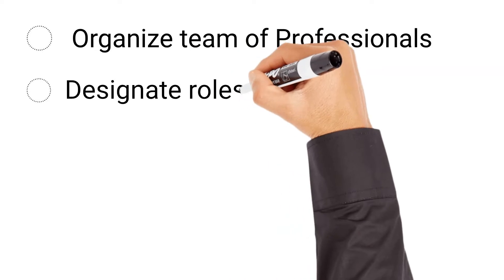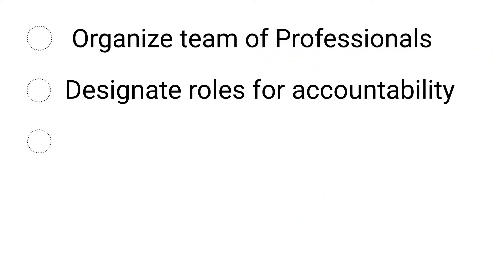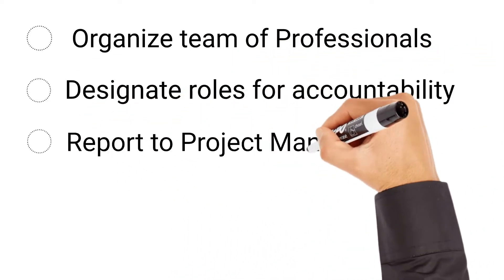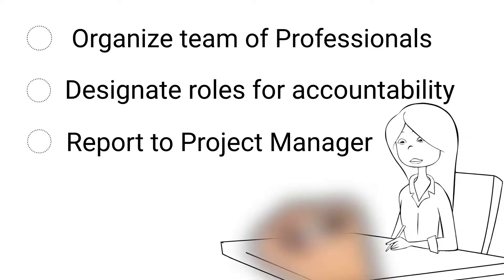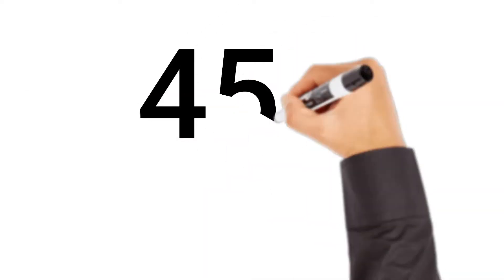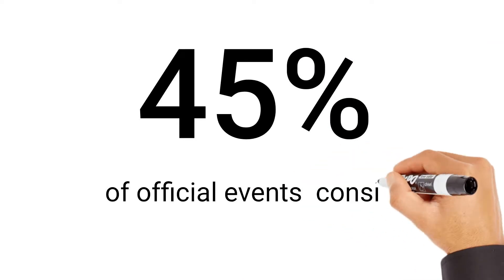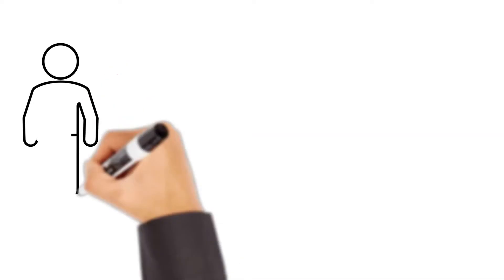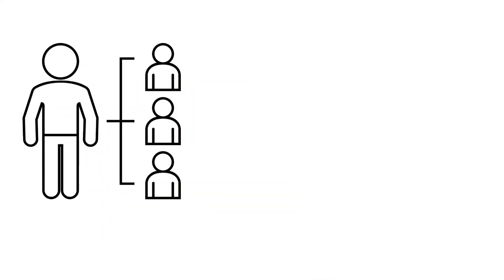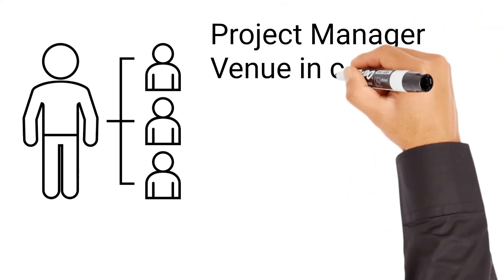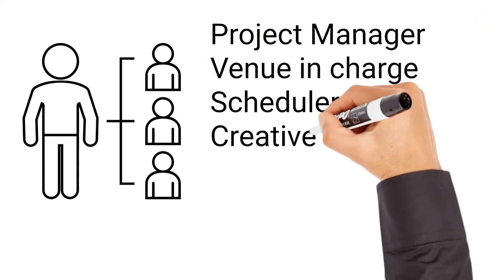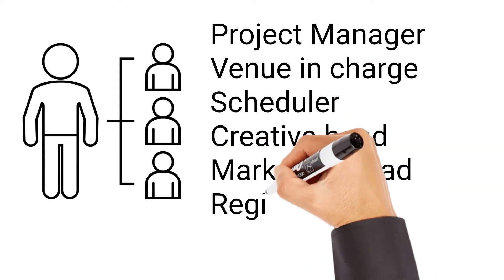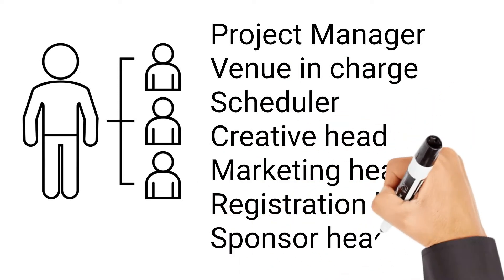All members of the team should report to a project manager who has visibility across all of the moving pieces. Do you know for about 45% of official events, consist of 2-5 numbers of event team members? So while building your ultimate event team, keep the above statistics in your mind. For example, if you're among the few that have 5-plus team members, then you can distribute roles like project manager, venue in charge, scheduler, creative head, marketing head, registration lead, sponsor head, and so on.